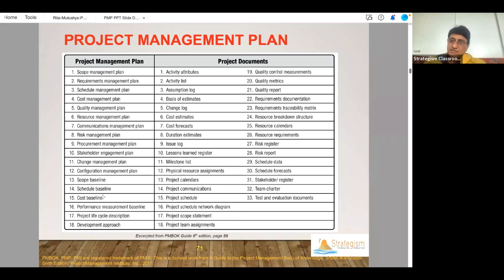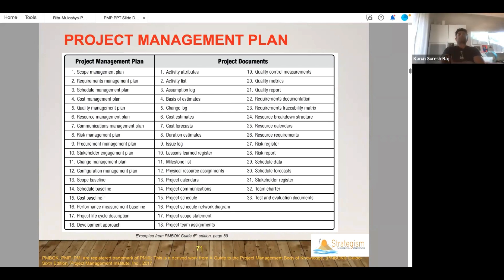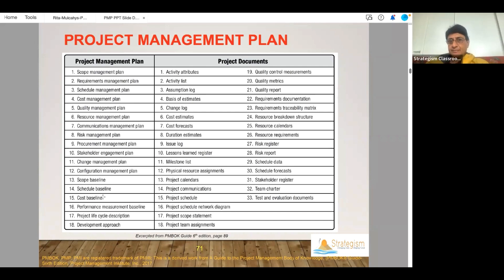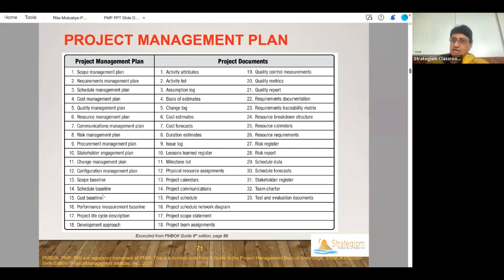The word budget, we use a lot in real life. But in the PMBOK, it is more of a baseline. It comes from the cost management plan. A cost management plan will be there. Cost estimates and forecasts will be there. Budget is a cost estimate.